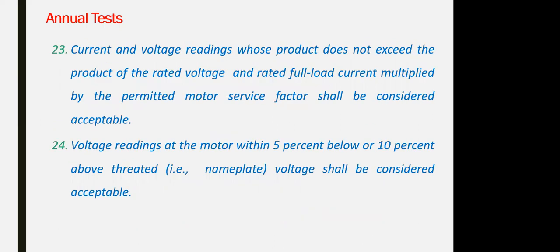This one is not related to mechanical, but for electrical, you should take into consideration the sizing of the generator selection. It's also part of the submission for the civil defense under electrical, the sizing calculation for the generator, and making a simulation for the generator to start receiving load at the start with the full capacity of the pump.